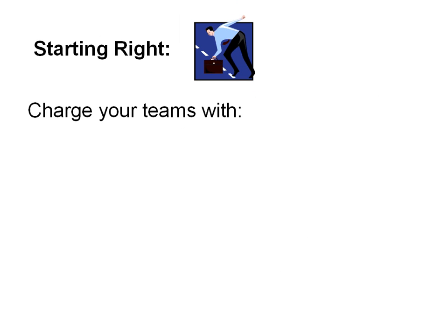is that there are a couple of side benefits from setting those teams up, assuming that you mean what you're doing. One of them, and an awful lot of organizations forget this and end up dealing with it later, is that an operational group feels good about what you're doing if it feels it's a part of your project. That doesn't happen very often. The typical is that the technical people might spend a couple hours with a couple of operating managers, and then they go off and design the system and bring the operating people in to tell them what they've done. And I've seen this in some very large organizations, and I've seen it happen very painfully.